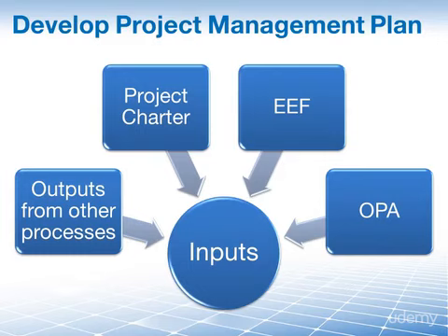Any baselines and subsidiary plans that are an output from other planning processes are inputs as we develop the plan. In addition, changes to these documents later on as the project progresses and moves through its stages may make it necessary to update the project management plan.